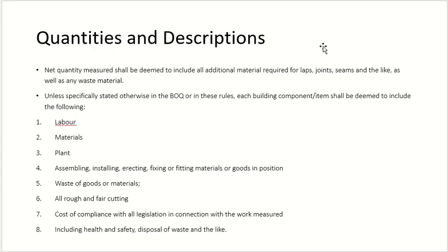Those materials. When you say cubic feet or cubic meter, when you say plaster, square meter. Plaster is made up of some materials, right? So when I quote the quantity of plaster, it is material, but you will not ask me for aggregate and sand and cement separately. It's all part of it.